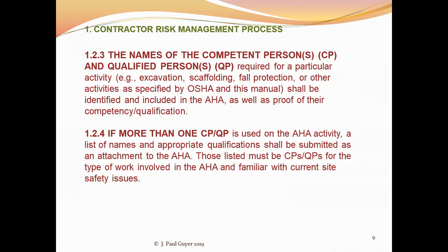And this is an important actor in this process, and the way this is accommodated in the activity hazard analysis is that on most versions of this form, there is a place on the form, and you will see this later on some of the forms, to enter the name of a competent person or qualified person.